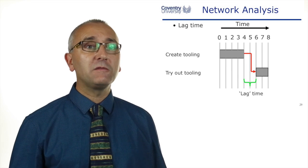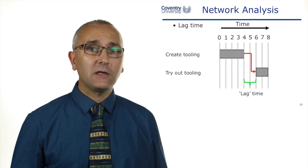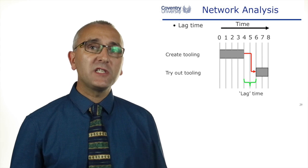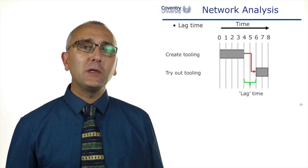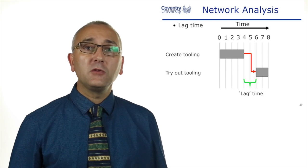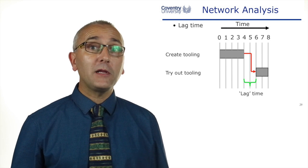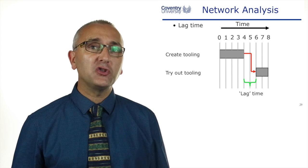Our opposite of lead time was lag time. This is where there is a delay between the tasks. Creating the tooling and trying out the tooling, there is a delay of two days, probably because there's a transportation or a delivery.